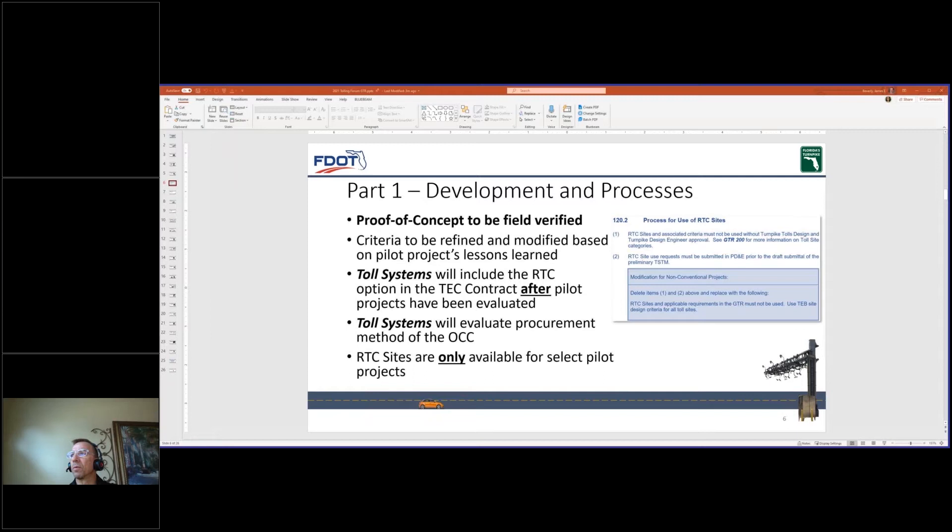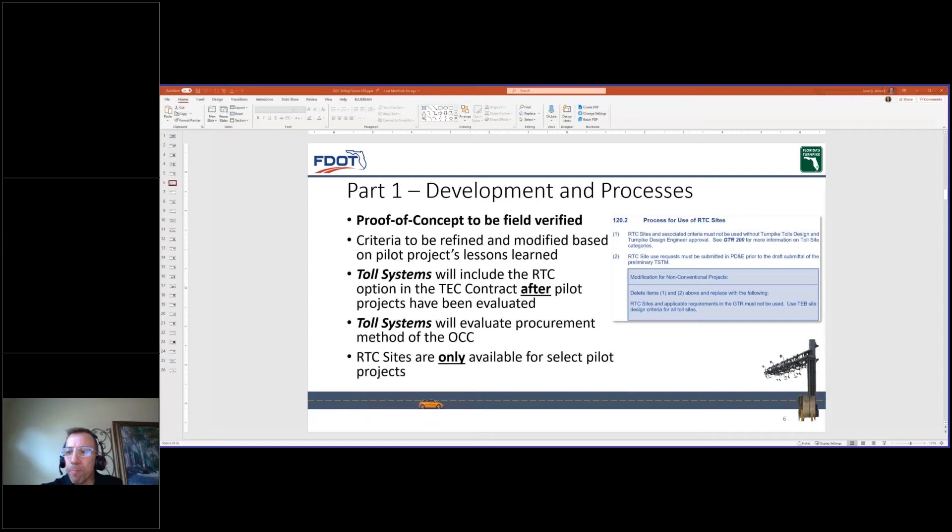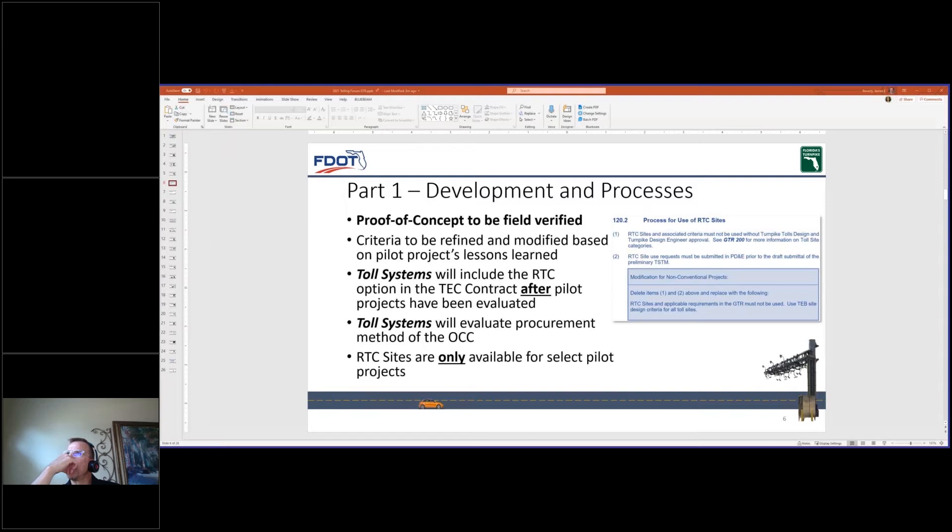Right. Right. So, the 2020 GTR would apply to those as well right now. Okay. We just need to clarify that. So, when does 2021 apply? Would it be starting July? Any contracts, right? Design bill contracts? Yes. The timing. James, do you mind if I speak up to that point? Sure. Go ahead. The RFP is going to dictate which version of the GTR to use. So, it'll be the version of the GTR that was available at the time that the RFP was advertised. Okay. Thanks.